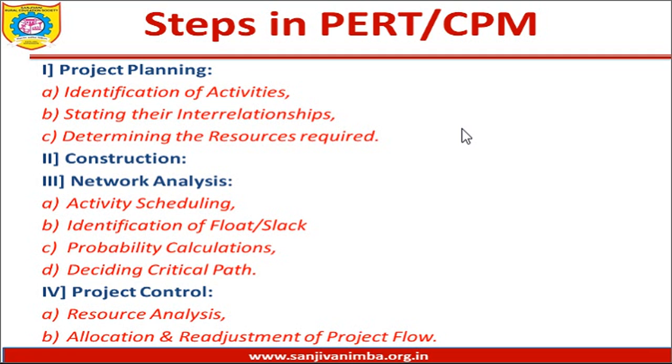Then the second phase is construction. Construction is simply you'll have to draw a network on the basis of the interrelationships of various activities which are involved in the process of completion of a project. So network construction is simply drawing a flow chart whereby you'll be identifying when the first activity would start, how much time the first activity would take, then when the second would start, and so on and so forth.